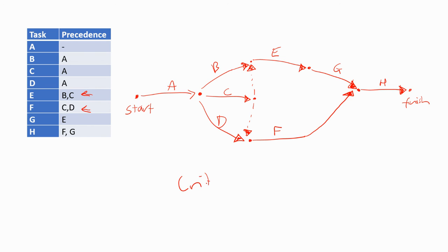So this here is the process of a critical path network diagram. That is what we have done there. We've drawn our critical path network diagram. Notice some of the key things is that we've labeled it, and we have included arrows to show the directions of the activities. This shows the precedence tasks, and it shows the flow in which these tasks need to be completed. Once we get some information about time, we could then work out what the critical path is, which is the series of tasks which take the longest throughout the network.